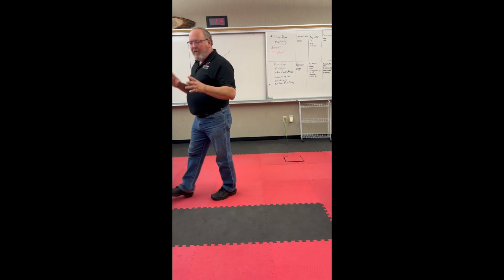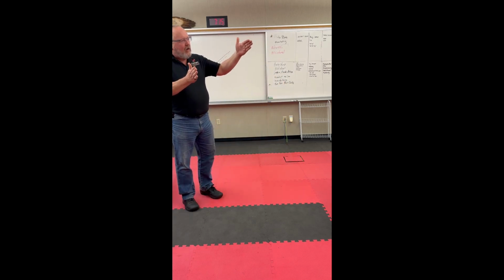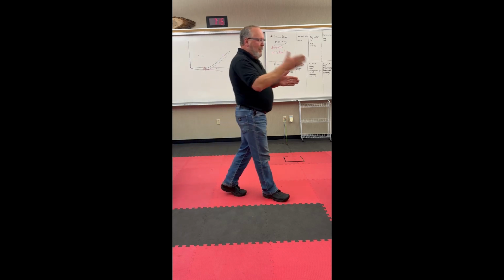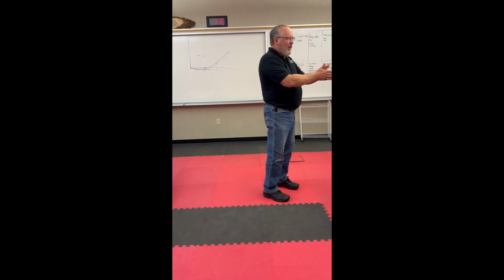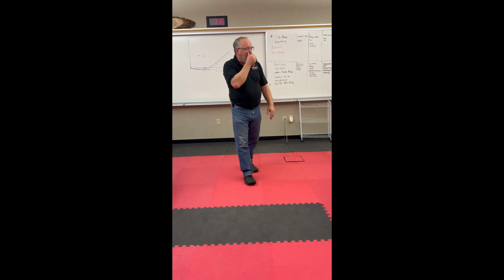But you're going to go back and do this testing. So you're going to identify, here's all the tests I need to do. Each test is going to take me a week, let's say. So you start backing up. That bottle of fluid, go back a week to finish that one test, back a week to do the other test, back a week, and realize you need to be testing by January, or whatever the time is, depending on the number of tests you have. Which means between now and January, what do you have to do?